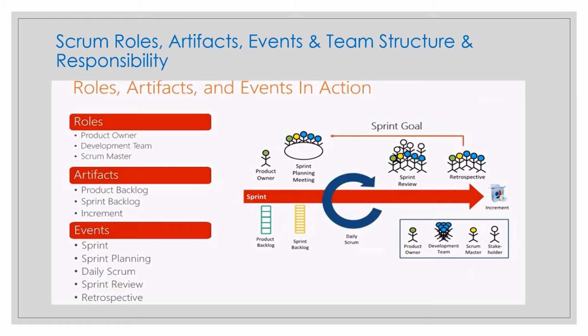Selecting how much can be completed within the sprint may be challenging. However, the more developers know about their past performance, their upcoming capacity and their definition of done, the more confident they will be in choosing their sprint forecast. For each selected product backlog item, the developers plan the work necessary to create an increment and meet the definition of done. This is often done by decomposing the product backlog item into smaller work items of one day or less, right?